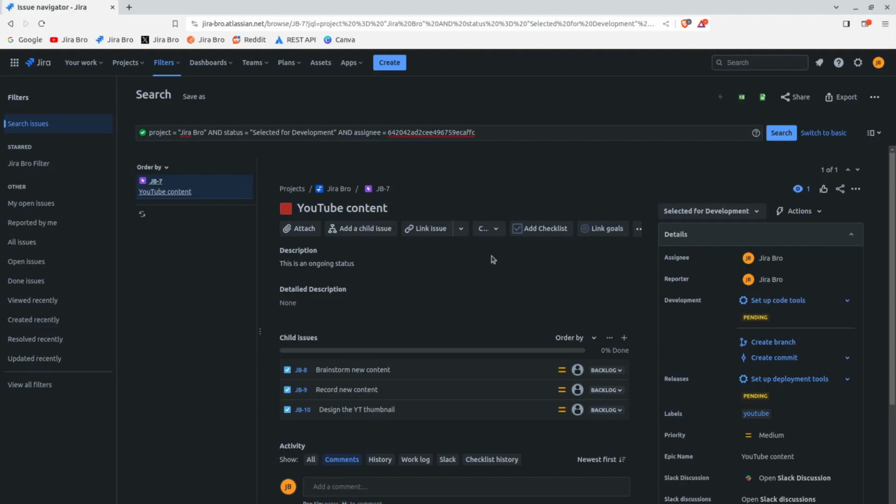But also there could be something, because when you put your ticket in the status, right? Those are the categories, because there are 3 status categories in Jira. Those are to do, in progress, and done. So that category of done can have different resolutions, right?